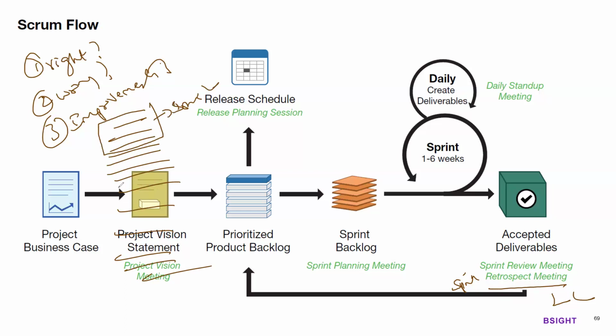So we discussed important points for the PMP exam regarding Scrum methodology, mainly about the sprint. Everything is time boxed. Duration of a sprint is 2 weeks. A sprint starts with a sprint planning meeting between the product owner, Scrum Master and project team. From the prioritized product backlog, they decide what to do in that particular sprint and document it in the sprint backlog to fulfill the sprint goal they fixed.